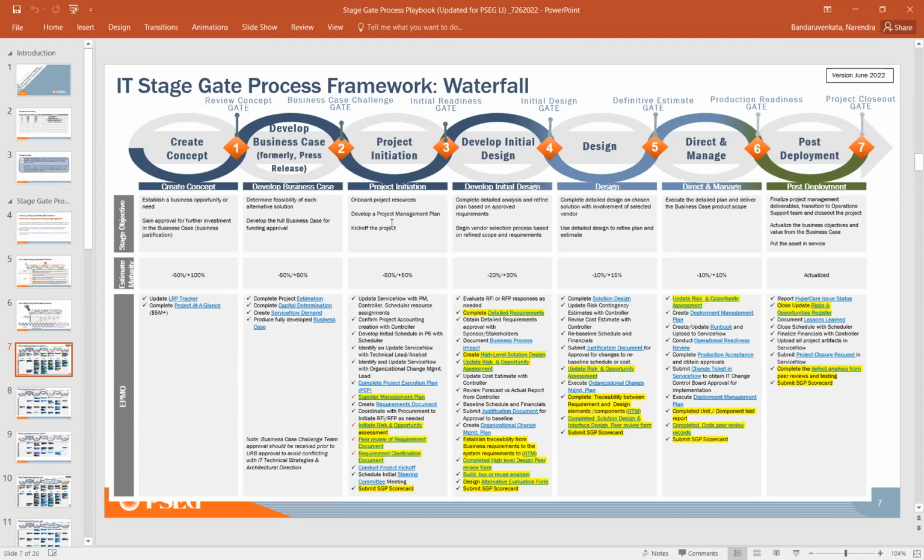Okay, that means you will be refocusing on the final design that has come up, which satisfies all the stakeholders, and then comes up with the effort and cost estimation, present it to your line of business and the sponsors and the senior leadership team, so that they are aware that a project that has been estimated at $1 million at business case level has now, because of various design considerations, gone up by X amount of dollars or has gone down by X amount of dollars. Both ways you can present it to the SLT and the sponsor, so that they can make a well-informed decision to continue or to discontinue. Okay, based on the rate of return on investment. So that's where the most important decision again is taken at the stage gate, gate 5.